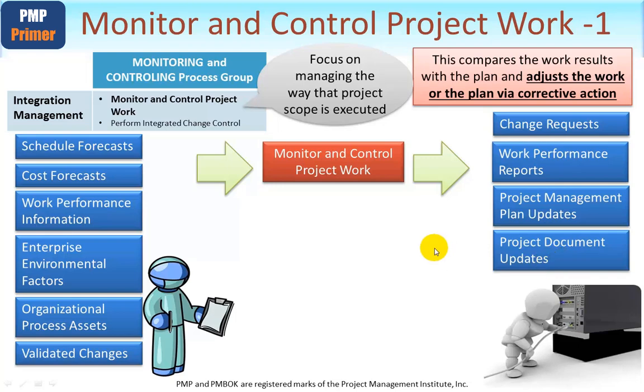For example, if you have an issue log, as a result of monitoring and controlling work, new issues may arise, which of course will need to be input, which may mean once they've been looked at, they actually turn into a change request if the issue is serious enough and it warrants being done formally through the change request system.